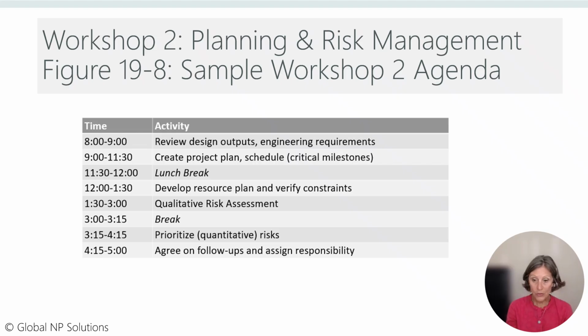Their information, especially their view of schedule and perspective on risk analysis, can be extremely valuable in generating realistic project estimates. Note that the agenda for Workshop 2 does not automatically include a management debrief. At this point, the project is managed by exception from the agreed upon constraints. However, if the team is aware of a specific high-risk element for the project or has challenges to meet a predetermined product launch schedule, a short 15-minute management debrief at the conclusion of the workshop might be of merit.